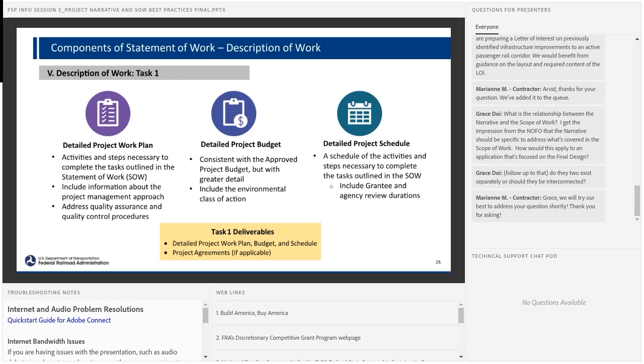So when you are filling out these attachments to include with the grant application, details are helpful, but we don't want too many details. And should your project be selected, and once we get to obligation, the grant agreement itself, the schedule and budget will not have too many details, and I'll show you as we get to those slides. But the detailed project work plan will. That will have a budget broken down more than just by task, a schedule preferably with a Gantt chart. But like I said, this is probably more appropriate for a post-award call.